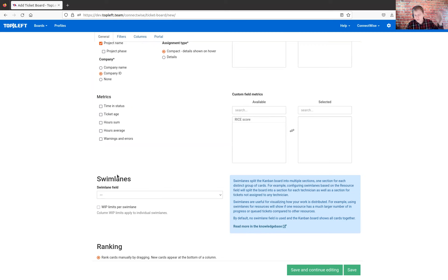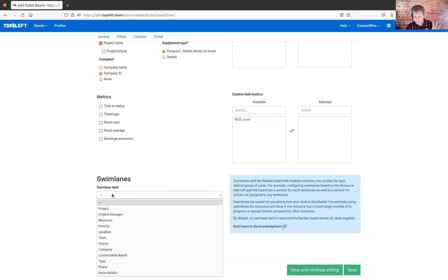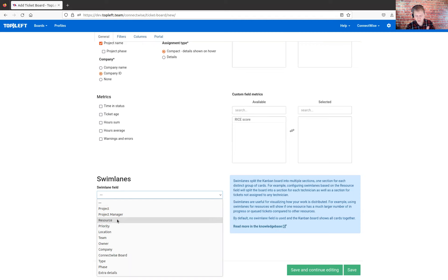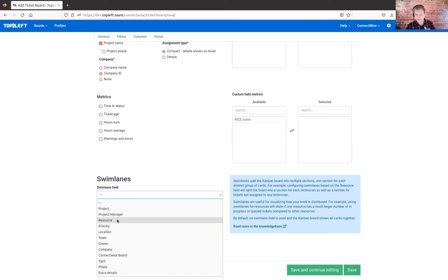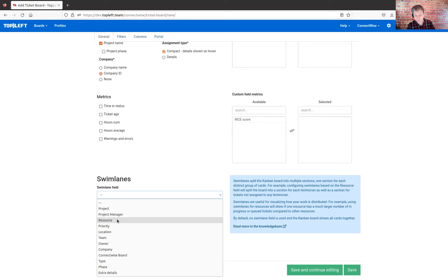Swim lanes is a key one. That determines how we group the tickets that appear on the board. If we just leave it blank, the tickets won't be grouped at all — we'll just get the columns, and within the columns, all of the tickets will be shown together. Sometimes that doesn't help us understand what's really going on with that work in your PSA, so you might want to split it up into different groups.